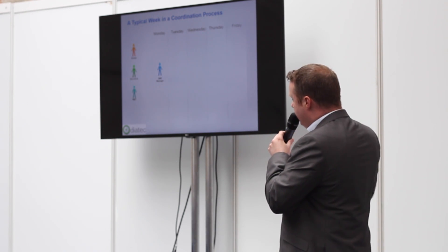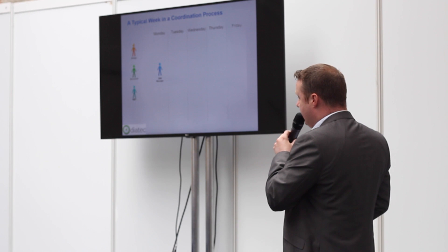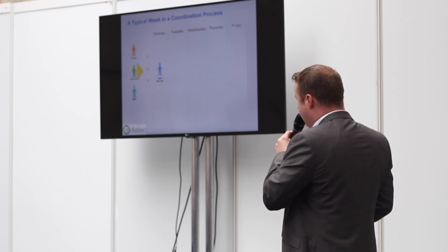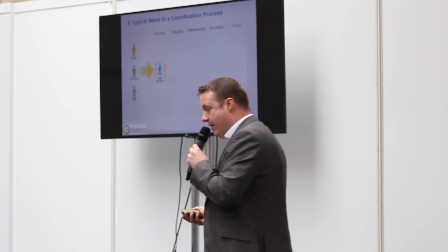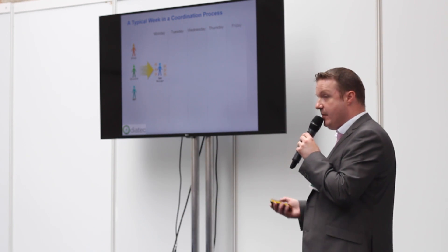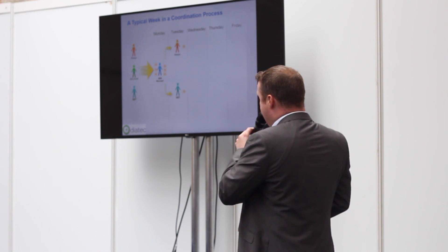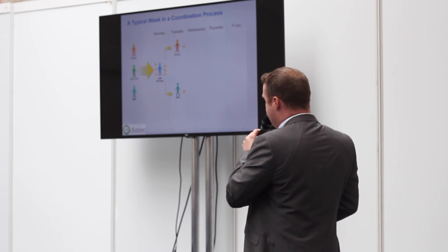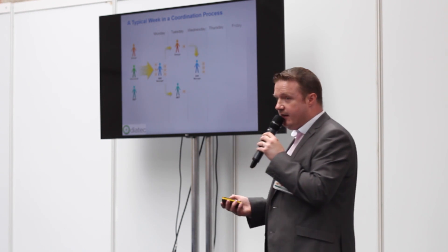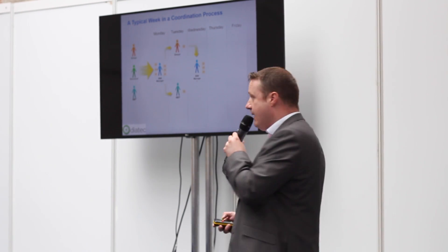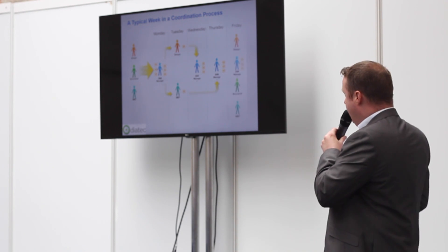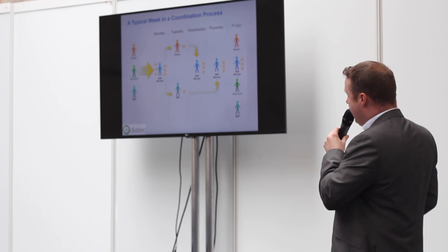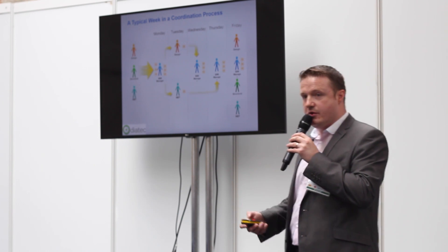In a typical coordination week, three main discipline teams are working on their individual models. That information is passed on to the BIM coordinator, who then has to disseminate and work through that information — it could be Monday morning. That information is then passed back to the relevant design team members to work on changes and issues. They might decide on a Wednesday that they've done enough and pass it back to the BIM manager, who may then take a day to work on that.